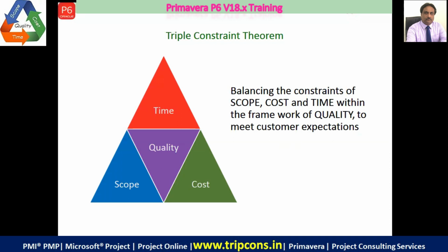You would do a rough calculation in your mind. Or what you can do, you can use Primavera to do it. Create a first level WBS, put the expected timeline. If you count backwards to today, or maybe a probable start date when you can start the project, then you see whether the time fits into the size of the objective, or whether the objective fits into the given time. Then you should negotiate with the client.